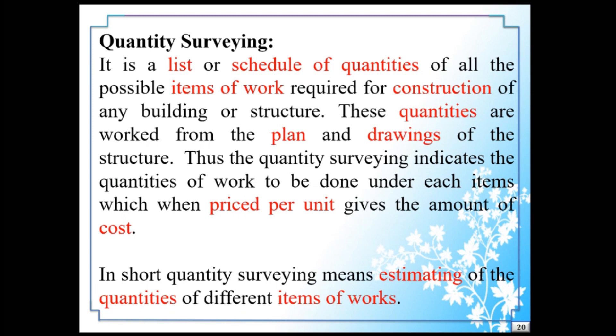Similarly, brick work, concrete work, reinforcement work, wood work, plaster work, painting work — all items required to construct a building or structure are listed. We add a list or schedule of quantities, and when we multiply the quantity of items by the unit price, we get the total cost of items of work. In short, quantity surveying means estimating of quantities of different items of work.